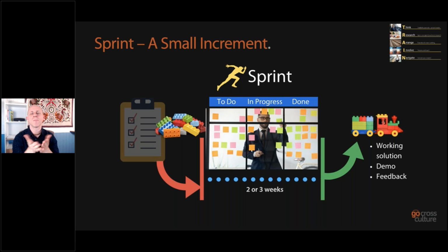So if you're building a piece of software in 3 weeks for an online bookstore, and the online bookstore doesn't exist, it's from scratch, what would be useful functionality as a customer that you could deliver at the end as usable? It's got to be usable, so it's not just producing some database tables and some middleware or something like that. It's got to be something that's fully working that the customer can interact with.